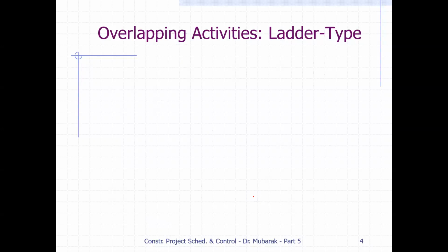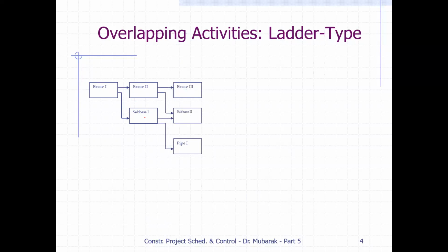So let's look at this example here. We have excavation one started, and then finish to start, we have excavation two starting once excavation one is done, but at the same time, sub-base one starts. Once we finish sub-base one, excavation three starts, and sub-base two starts, and pipe one, meaning the laying down of a portion of the pipes, starts all at the same time.